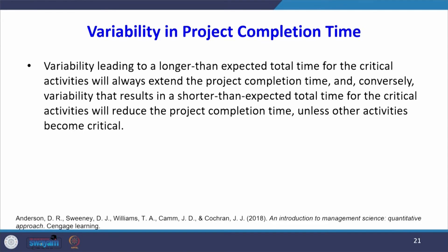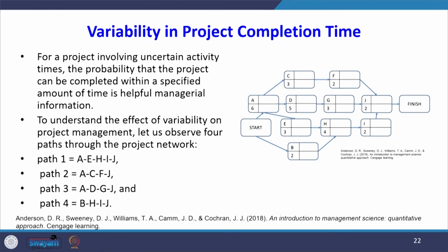Generally, we are concerned about activities in the critical path. Variability leading to a longer than expected time for critical activities will always extend the project completion time. Conversely, shorter than expected times for critical activities will reduce the project completion time unless other activities become critical. Whenever we provide the mean total completion time, we must also provide the variance.